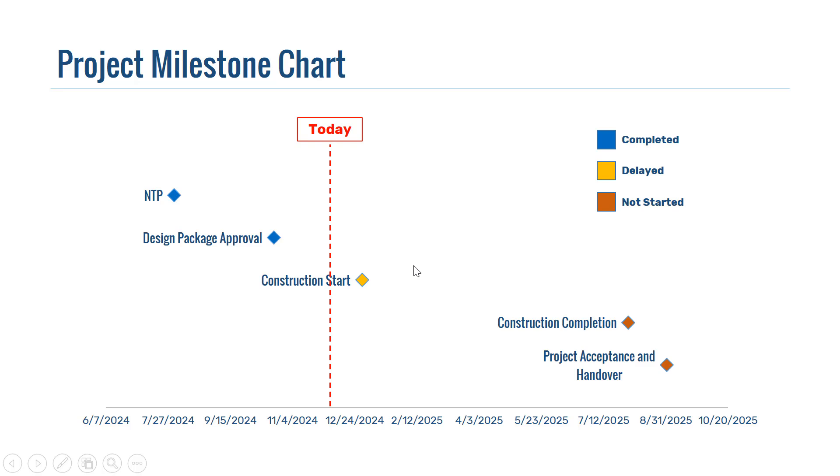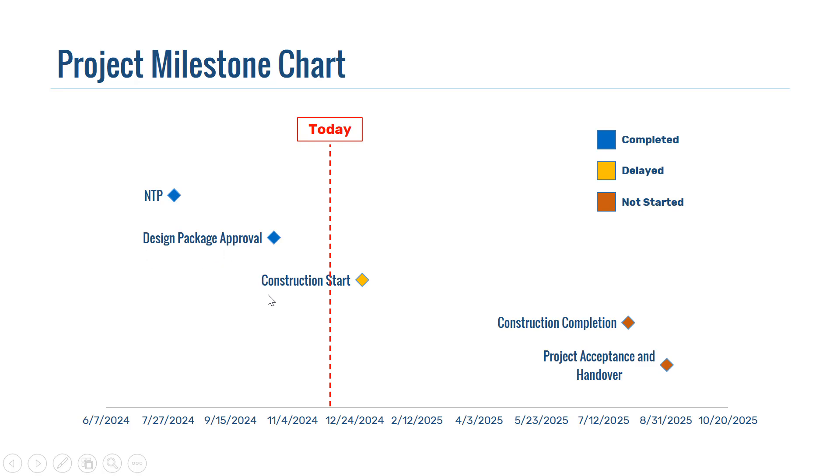As mentioned earlier, in this milestone chart, we have the key events or key points in our project's timeline. For example, we have the notice to proceed, then we have the design package approval, and then the construction starts and the construction ends, and last but not least, we have the project acceptance and handover.